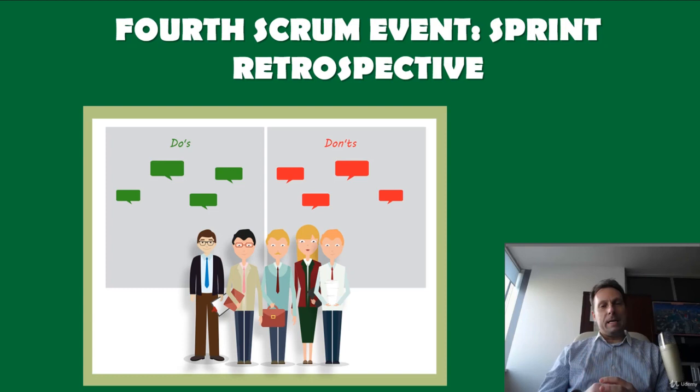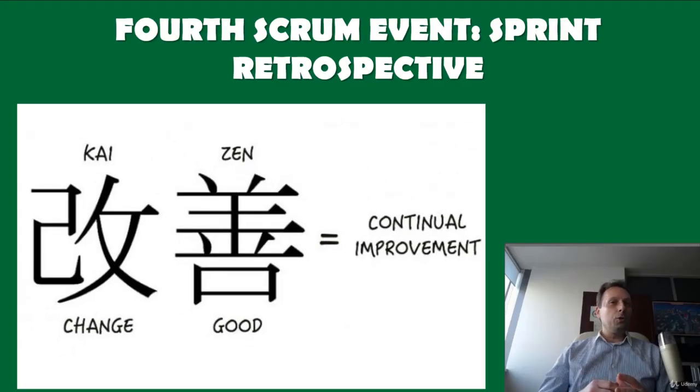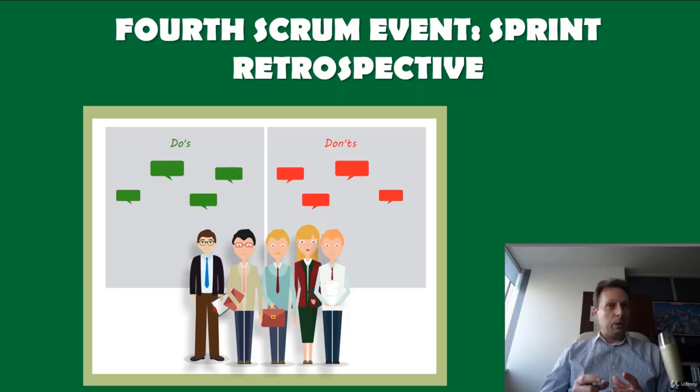So by the end of the meeting, the team and the Scrum Master should agree on just one process improvement that they will implement in the next sprint. That process improvement, sometimes called the Kaizen, should be put into the next sprint backlog with acceptance tests. At the next sprint review, the issue is revisited to see what difference, if any, the process change has made. If team performance improved, the change should be kept. If performance did not, the team needs to develop another hypothesis on what the root cause may be.